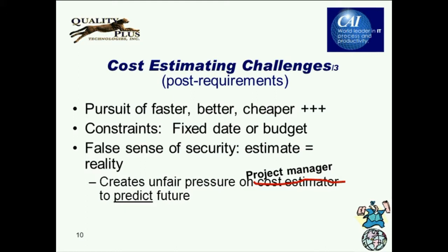It's something like this. Carol, I just came from a meeting, and I promised the legislature, the Congress, my staff, marketing, that this unnamed project will be finished by March 31st. What date can you give it to me? And then we back into that all the way, and we say, okay, March 31st, so that means testing needs to be done by February 28th. That means that this has to be done by, and so requirements had to have been finished 2 months ago. That can be a constraint. That can be a major problem. And date-driven estimating is really not the best way of going.